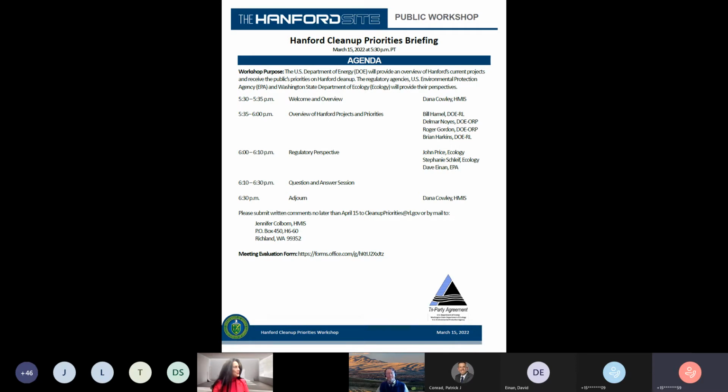Colleen, who do we have in queue first, please? First in queue, we have Dwayne Schmoker, and his question is, is the 7 million added to the original 10 million that Congress provided for TBI in 2020? In short, how much money is now available for the off-site disposal initiative? Thanks for that question. Your math is correct: the 7 million in this appropriation would complete the funding necessary to complete the TBI phase 2 2,000-gallon demonstration. We're currently working the waste incidental reprocessing process, followed by NEPA documentation, and then ultimately we'll be in discussions with the state on the permit. So that's the final piece of funding for that work scope for phase 2 of what has been called the test bed initiative.